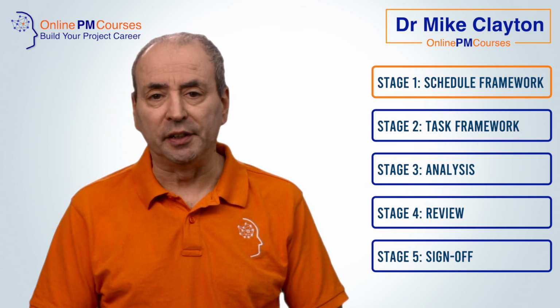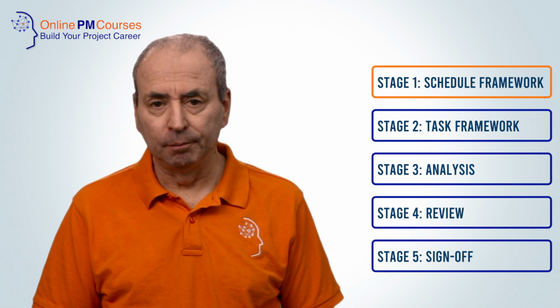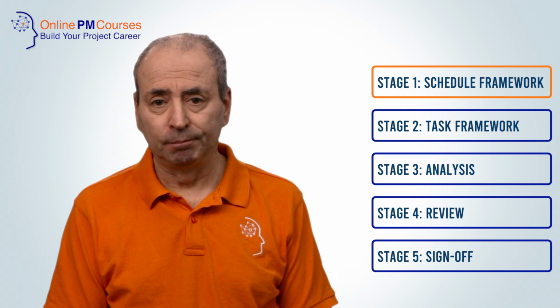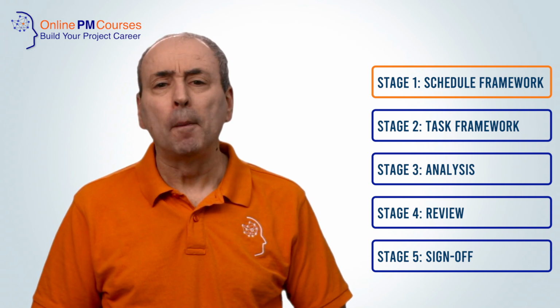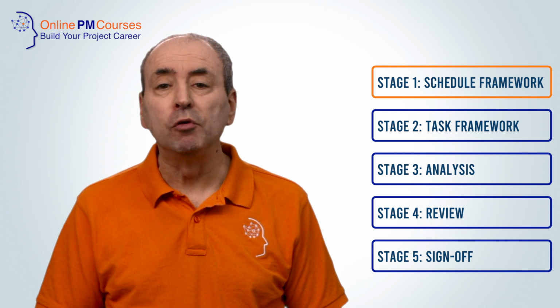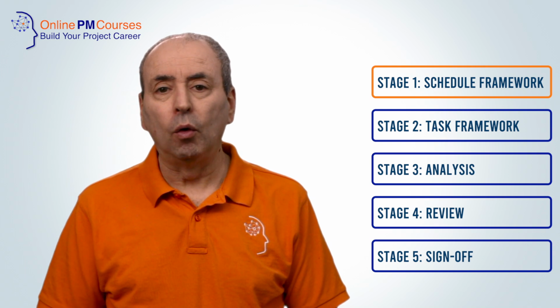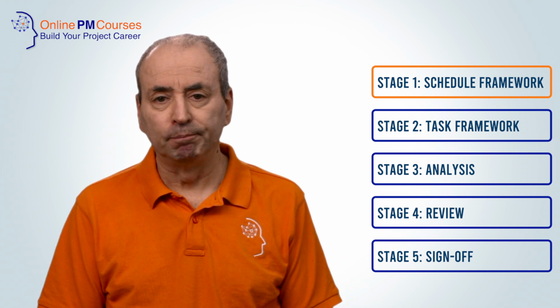Step 1. Start with fixed milestones. Things like the start date and release or delivery dates. Step 2. Add in discretionary milestones. Things like reporting deadlines and release targets. Step 3. Add in calendar constraints. Things like public holidays and company days. Step 4. Add your resource constraints. Things like staff holidays or the delivery schedules for assets or materials that you'll need for your project.